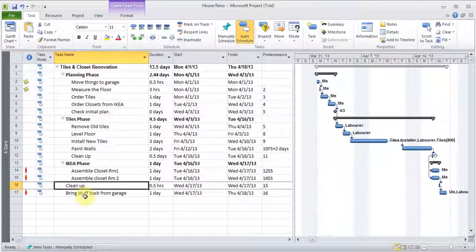You can try to fix it in a couple of different ways. One way is I can add my dad somewhere in the system and then add him as a resource, or I can remove myself from some of the jobs, or I can even add overtime to certain jobs. Not in this case, but if there were some jobs where I wanted, I could add some overtime to it, so as to make my job task get done faster if I wanted.